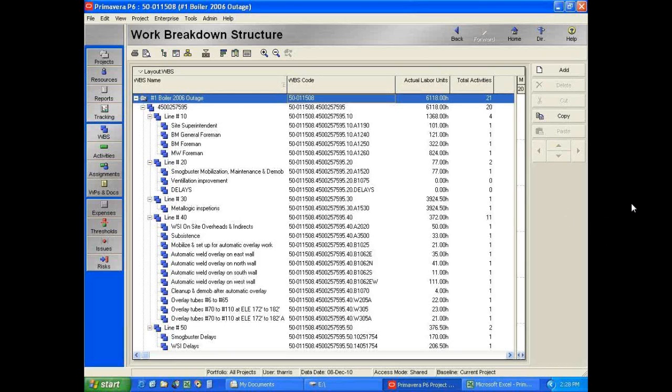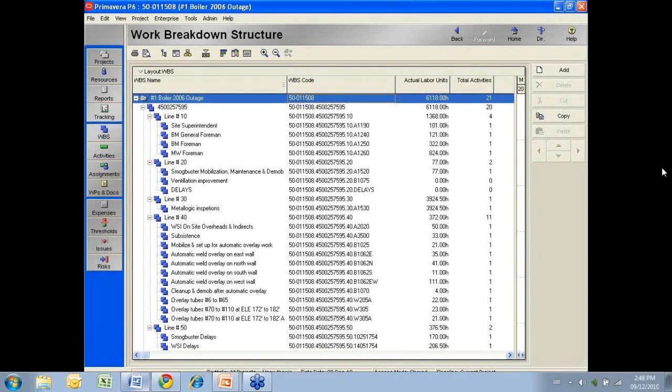The next screenshot is a look at that same Primavera schedule, but now with the actual hours loaded in the schedule. So the hours are loaded into Primavera and available to review. Again, I mentioned it several times earlier, Primavera will have a set of business rules or business logic. So if there are any inconsistencies between DTC and Primavera, they'll be identified and potentially rejected during the import process. You'll need to fix them and re-import them to make sure that we're meeting Primavera's requirements.